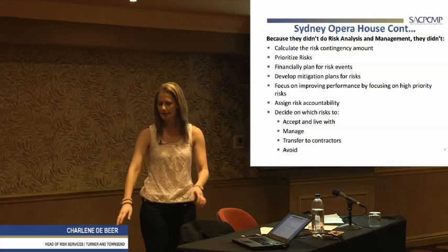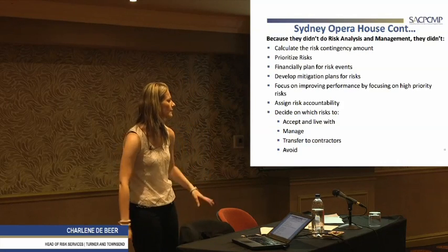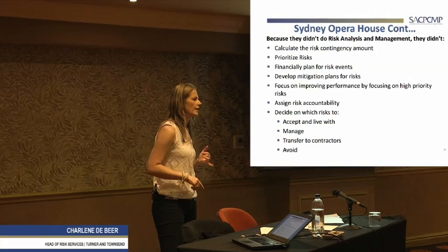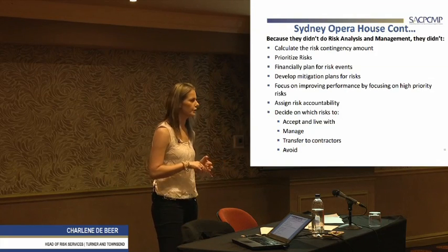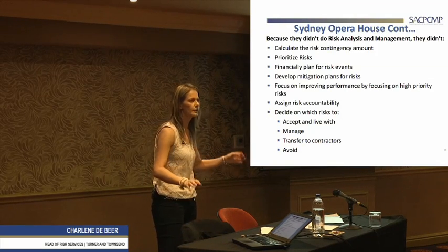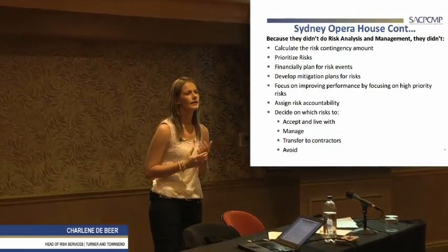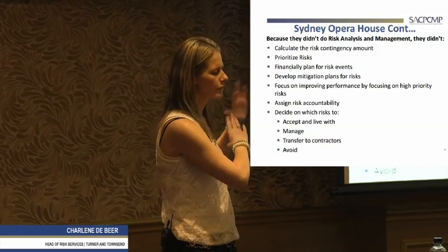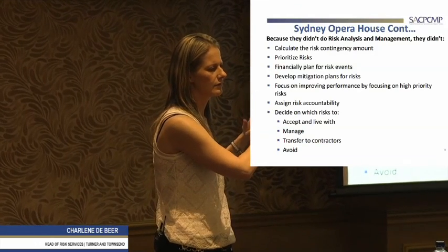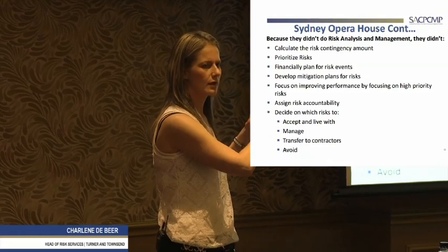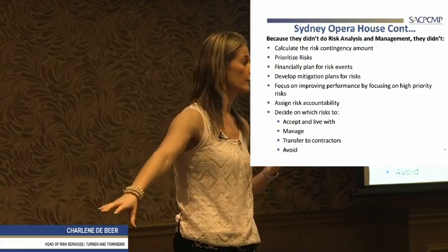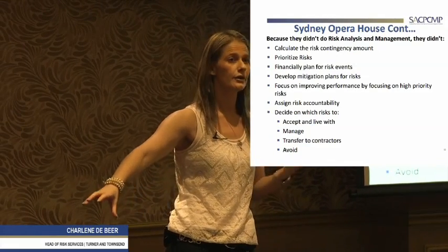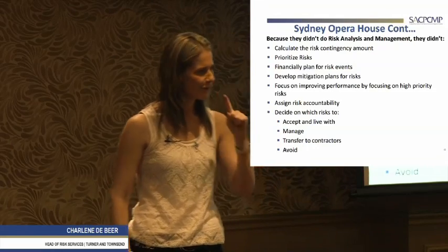I say, okay, and then down at number 10, there might be a risk like, we don't know if we have enough budget to finish this project, or the engineering is only 20% model review. And then I'm saying, why do we think that rain or wind or any of that poses a bigger threat to cost and schedule than we're not even knowing if we have enough budget or how the whole engineering design is going to look? So very important.